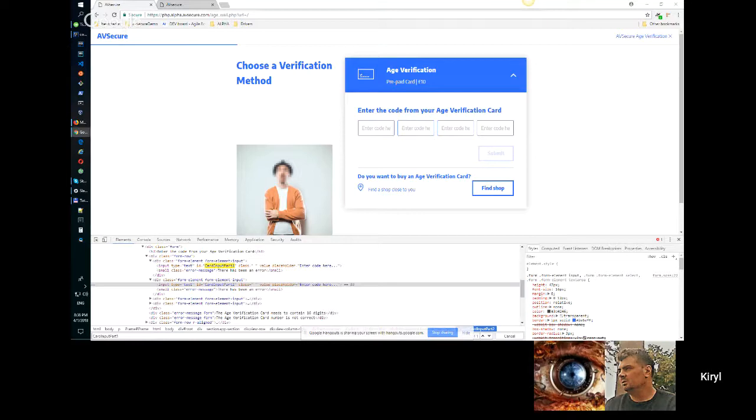So we have decided to create a list of tasks we need and can finish by Monday, only by Monday, because I am not really sure what exactly we should focus on in the next sprint. I know that we need to reach 2.1, but we need to really understand what tasks we need to do. That is why we have created a pool of tasks to finish by Monday. And on Tuesday, we'll have an additional sprint planning to plan the whole next sprint.